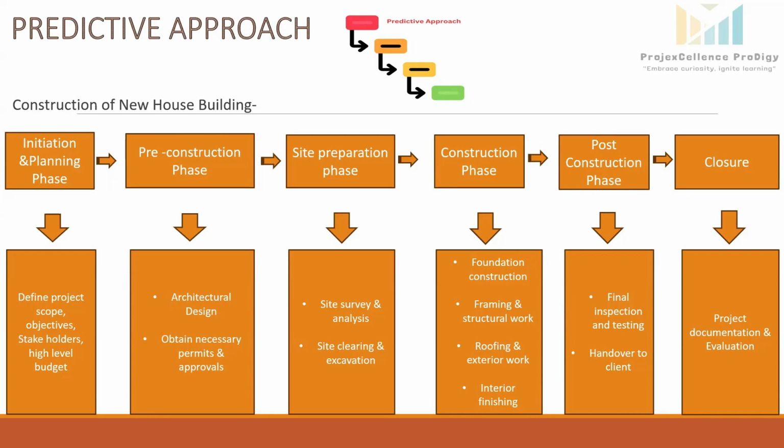Like, I am the main stakeholder, and apart from me, he will ask how many family members we are, and who the local authority is in the nearby area, so he shouldn't face any kind of problem later. And who is our neighbor, are they cooperative if we run this project? So many questions will come up. After questioning, mutually we will define a project scope, what will be done during this project life cycle, and what activities will be in the contractor's scope, and what particular activities will be under my scope.